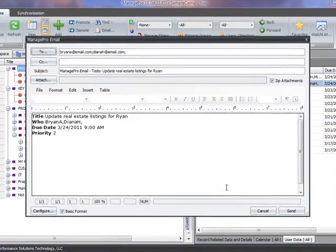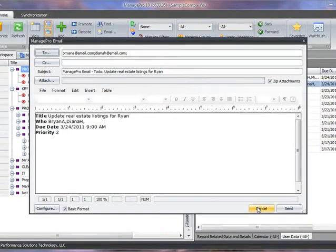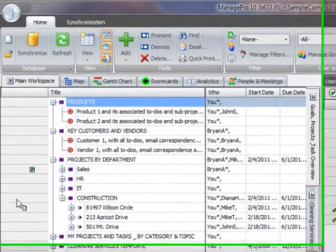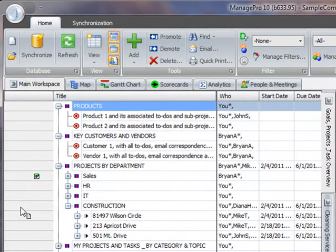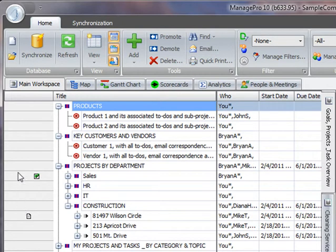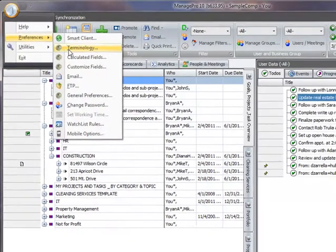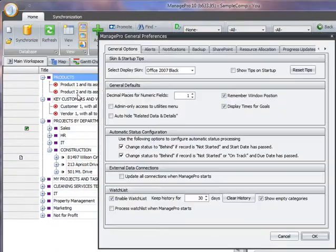If you would like to configure ManagePro to automatically create an email when to-dos are assigned, progress updates entered, and projects are completed, simply use the Program button, Preferences, General Preferences, and Notification tab.